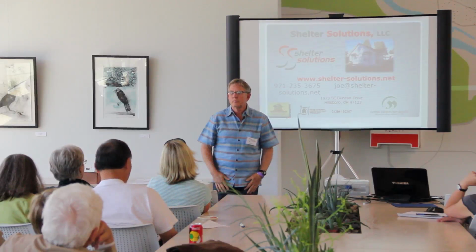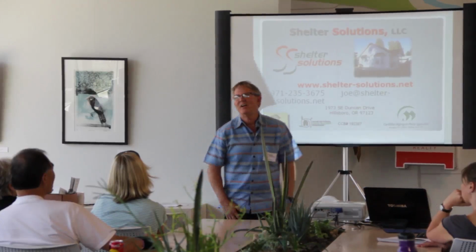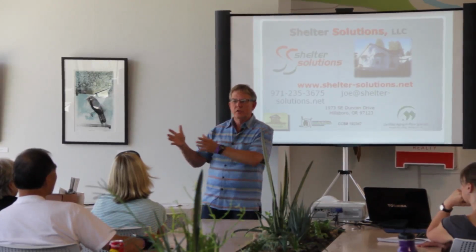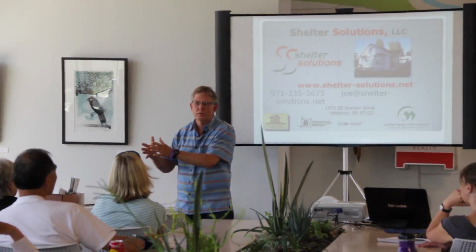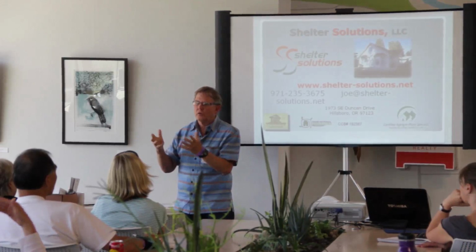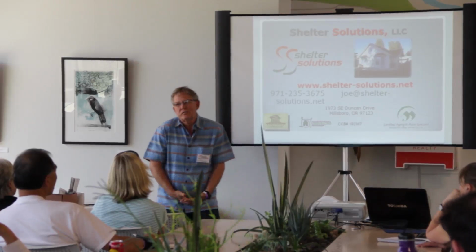The structure. What I have heard from just one or two people is that if the original garage was permitted, say in 1950, partially, they do grandfather some things in. Like if it has 2x4 walls, and you're finishing off that space, they can't make you do 2x6 walls. They let you use the existing conditions, so you're insulating not up to today's standards, but the best you can do in this situation. What I'm talking about is mainly structural issues. And structural issues, they want to know that it's structurally sound by today's standards. So there's certain things they let you go with, but not safety and structural things so much. Each one's an individual case, but that's just kind of generally what I know.